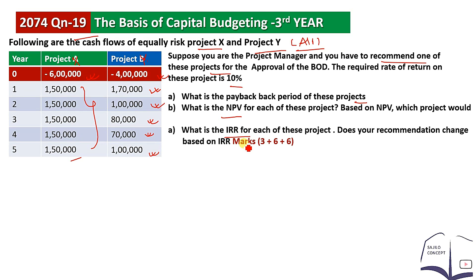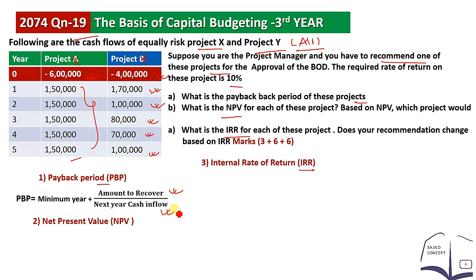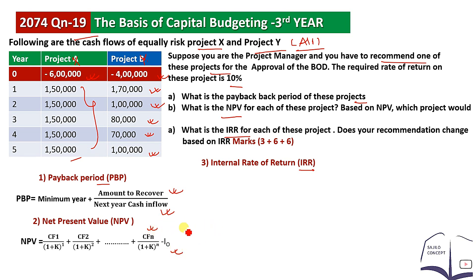So we need to find the payback period, net present value, and IRR. The payback period formula is: minimum year plus amount to be recovered, divided by next year's cash inflow. Net present value is: cash flow divided by (1 plus K) for year one, plus cash flow of second year divided by (1 plus K) squared, minus initial investment.